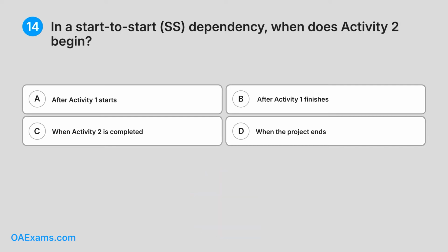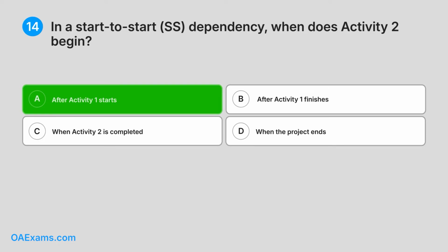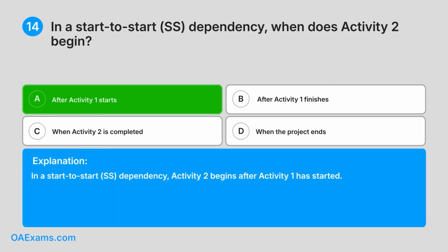Correct answer: A. After Activity 1 starts. Explanation: In a start-to-start (SS) dependency, Activity 2 begins after Activity 1 has started.